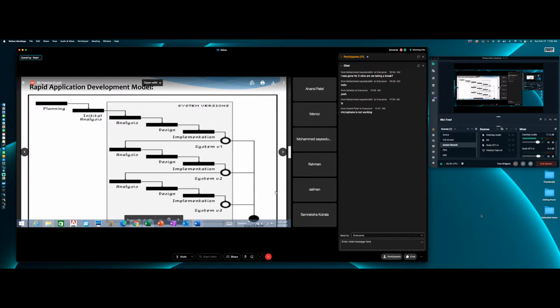Yeah, can I ask a question? One second. Let me finish my analysis, then you ask. On the other side, what did you do with your resources factor? You went from a 5-man team to a 15-man team. So you increased that by a factor of 3. So what do you think the cost will be? Constant, right? Constant, yeah.